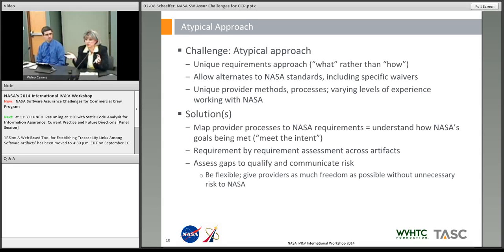The rest, to describe it is very simple. To do it was a little more difficult. But regardless of whether we had one or more documents, we just made a column in the spreadsheet with each of the documents at the top, and we assessed each one against the set of questions. Whether it was one document, so we had one cell, or whether we had a variety of documents and we had a whole row of results.